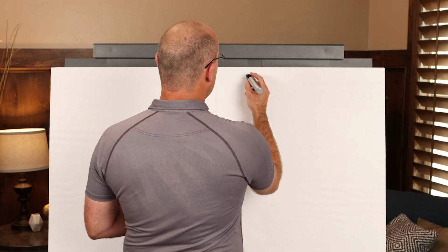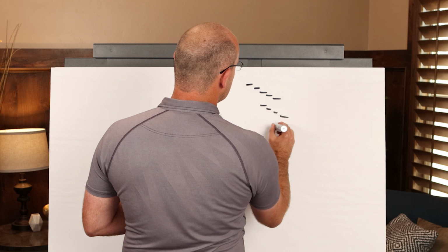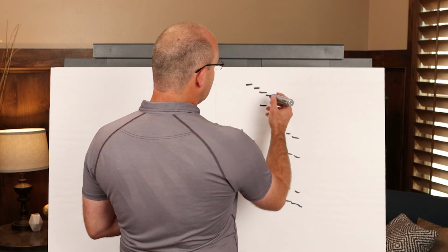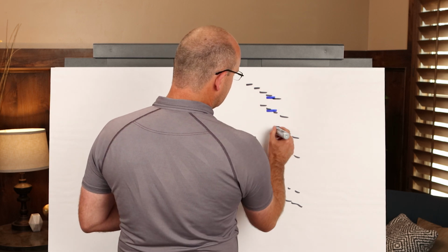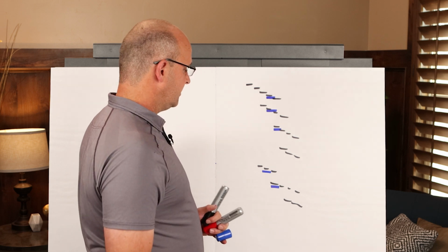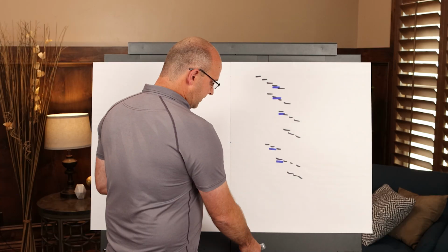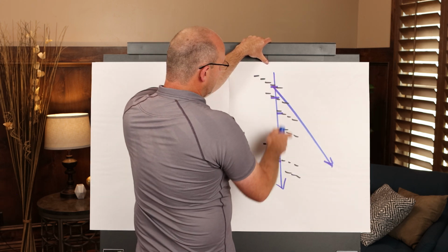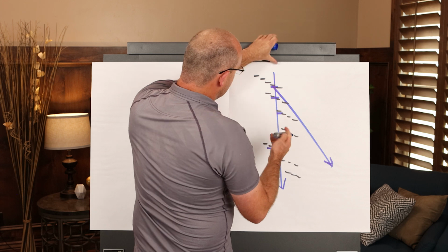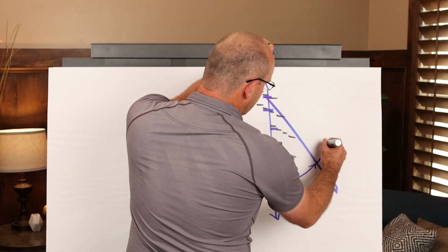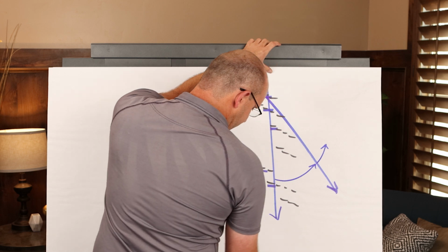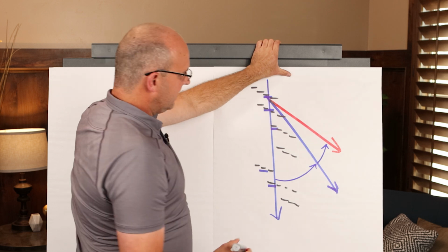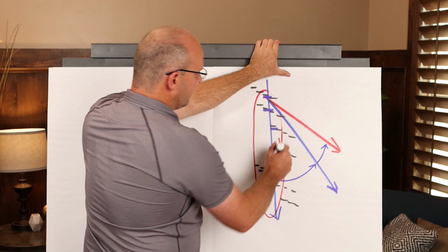One of the things that I absolutely hate about the CPM system is that when it is scheduled, you can have multiple trades just stacked. And yes, you can identify this with activity codes. Is it practically done? No. Do people just use this as an excuse to win an argument with me? Yes. So in a CPM schedule, instead of having the trade partner run out with a beautiful flow like this, they attempt to stack the work. This is impossible. It will end up going back to the original production rhythm plus the waste that they have from trying to actually accomplish the deadline, and your actual line of balance will be much worse. Even if the trade partners could do this, this overburdens and hurts people.